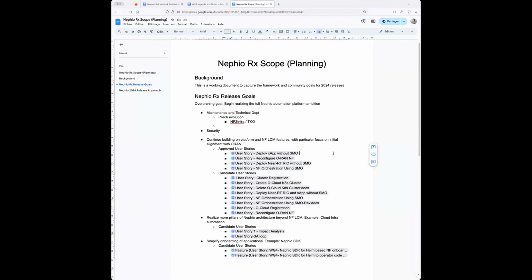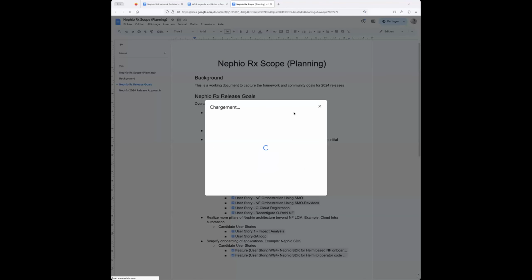Yeah. Okay. So the next step, sorry, I just want to capture it, is to start populating the JIRA with the various tasks for these user stories. Correct. So for each of them, we create issues in the SIG2 tracker, and then the individual items. What we typically do is create an overarching epic, as we call it, in which we list the individual work items, because you can then divide and conquer.